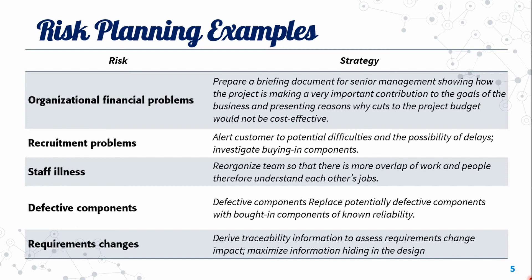Examples of risk strategies include buying in components, managing staff illness by reorganizing the team, and addressing defective components by replacing them with non-defective, reliable components.